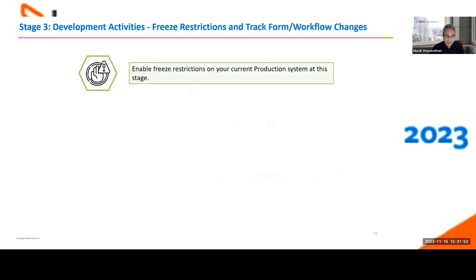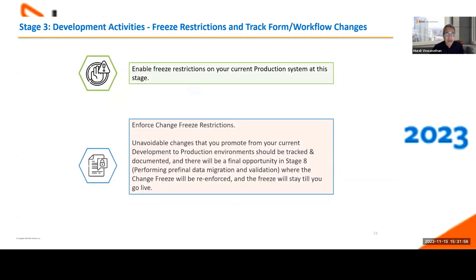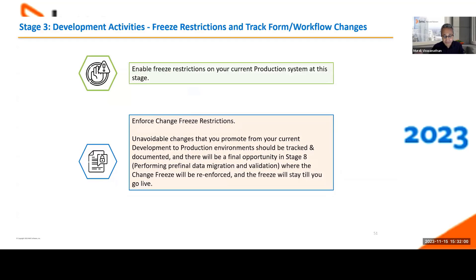Stage three is all about your development activities. At this time, we highly encourage you to enable a change freeze in your current production system. If, between now and go-live on the container platform, you still have to promote unavoidable changes to production, we recommend documenting those changes. There will be one more opportunity during stage eight — pre-final data migration validation — where you can apply those changes. Any unavoidable changes between this stage and the final stages should be tracked so you can re-import them.